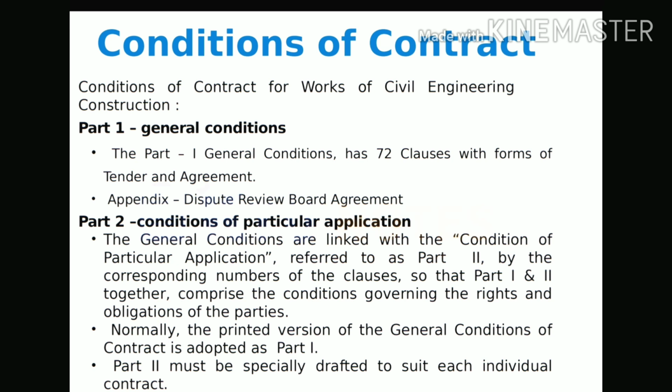The owner can terminate the contract in the event of default or bankruptcy of the contractor and may impose penalty as per the contract agreement. Due notice must be served on the contractor before termination of the contract.